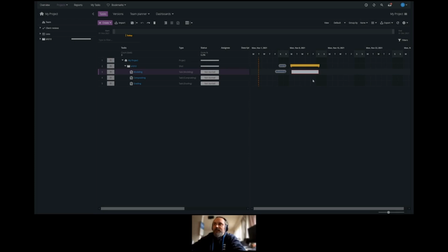to show the task. As a side note, when you create a task, which will typically exist underneath an object, in this particular case a shot, the shot start and end dates are always going to inherit the earliest start date and the latest end date of the tasks within it. So here we can see we're adjusting the time. And if I have save changes turned off automatically, I can just use Control Z to undo any change if I don't want to commit it to the spreadsheet automatically.